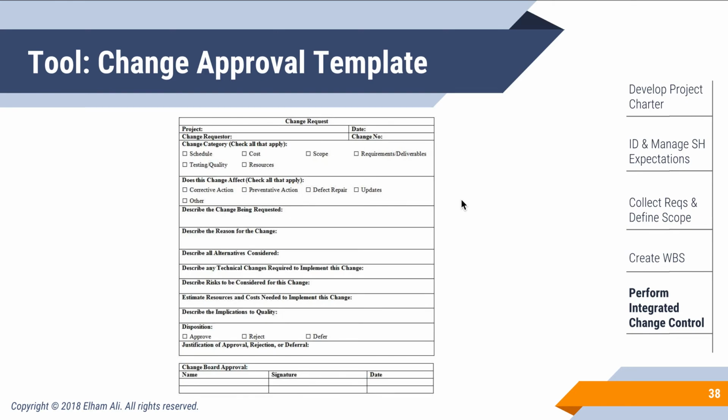So let's go through a specific template. This is a change request template that I've used before, and it includes mainly the important things that I care about: the definition of the change, your impact, the cost of it, schedule, budgets, and whether there are any alternatives to this change, or whether it has to be the change as the solution. And then your approvals. I usually keep my change approvals extremely short and succinct. If they were long, most likely my change team or even team members would not be motivated to complete this. So short and simple as usual.